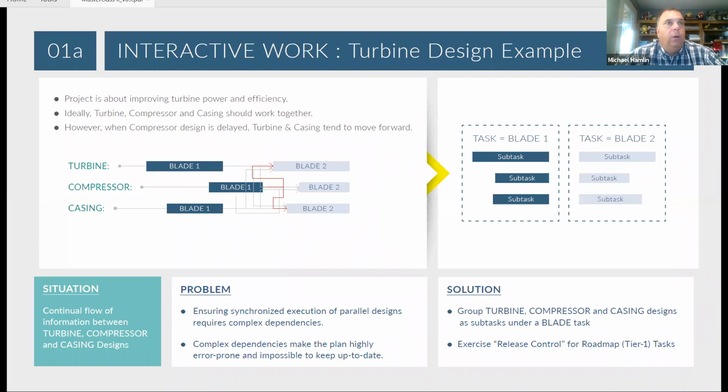And each one really had their own project plan that they were working to. And what would happen was, even though they initially set out in their master plan to have work being done at the same time, because of the normal uncertainties, because of delays and things of that nature, now they ended up becoming separated. In other words, while I call this blade 1 versus blade 2.